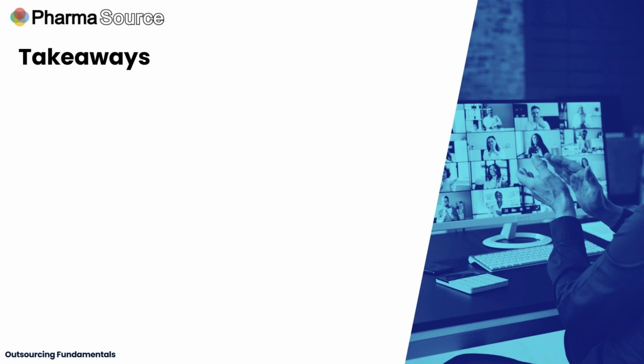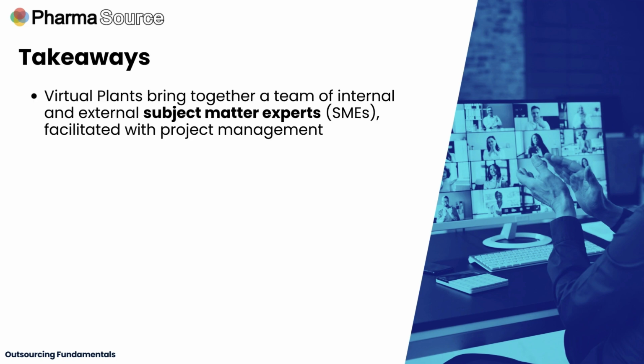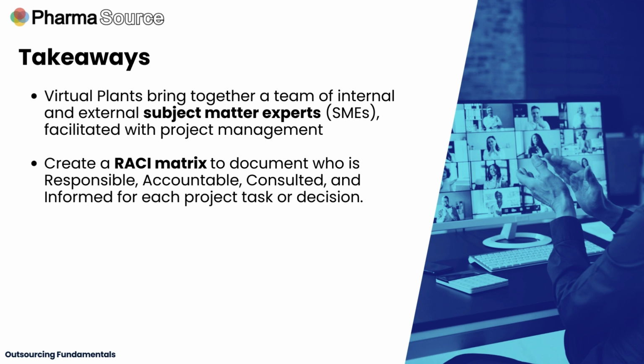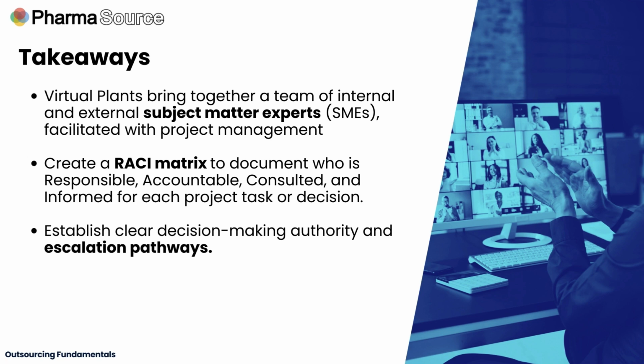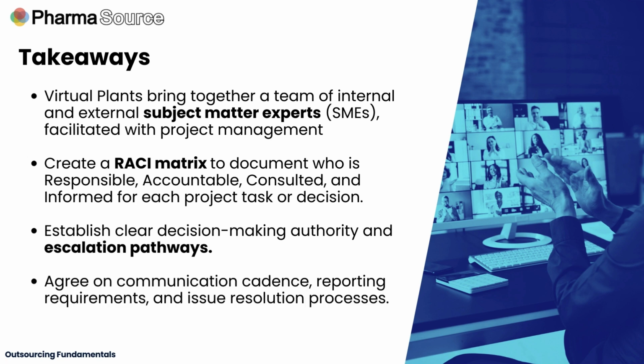Takeaways from this module. Virtual plants bring together a team of internal and external subject matter experts, or SMEs, facilitated with project management. Create a RACI matrix, or an equivalent, to document who is responsible, accountable, consulted, and informed for each project task or decision. Establish clear decision-making authority and escalation pathways. And agree on communication cadence, reporting requirements, and issue resolution processes.